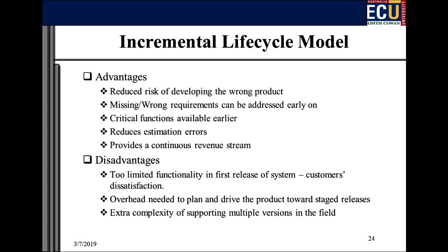There's an extra overhead in stage releases, okay? Because they kind of have to work together. You can't have something up and running in a company and then decide to re-engineer the whole thing and do it again. And there's the extra complexity of supporting multiple versions in the field.